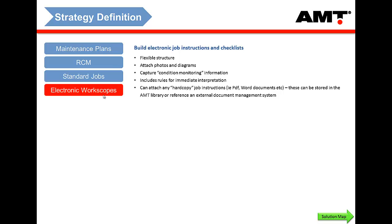Strategy definition for us is a lot more than just saying we're going to do an engine at 16,000 hours. It's about identifying what your strategy is for optimizing the life of that component — condition-based, run to failure, or scheduled. It defines what parts are needed, expected labour requirements, and the associated job instructions. So the planner doesn't have to second-guess — when he's told he's got to plan for an engine, the parts, labour, and job instructions are all listed. The more you can define upfront, the more it streamlines your downstream workflow processes.